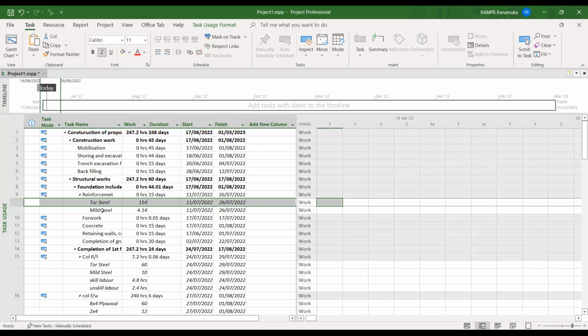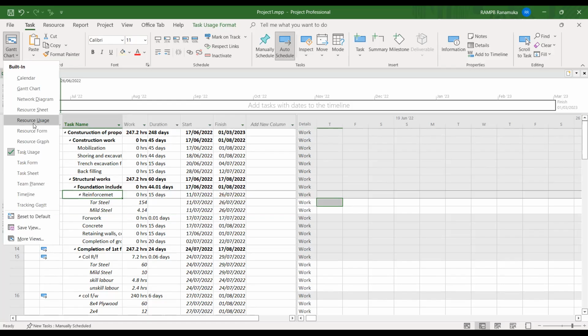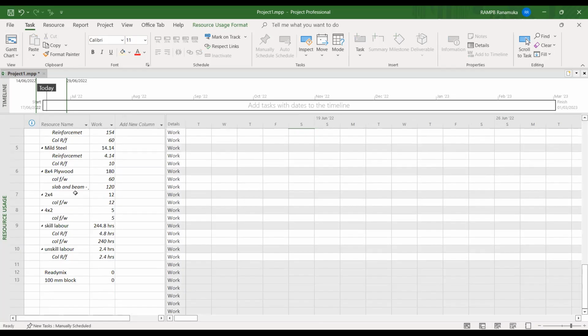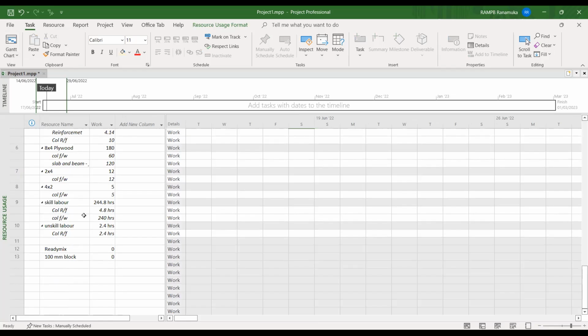This is only one event. For one event we can see these kinds of items. If you go to the resource usage, we did only one work, nearly 5 activities. If you have a program of 1,000, 2,000 or 4,000 activities, how can we allocate all these resources and monitor them? It is very difficult. Some companies are doing that, but it is very difficult and not recommended.